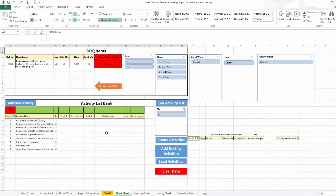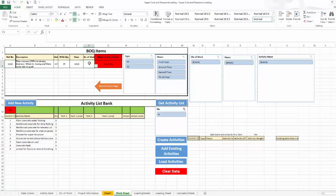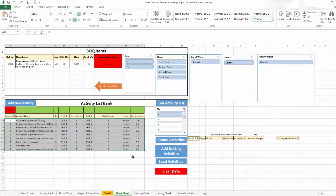Now let's go to the detail section where I can make a very detailed cost loading. In this case, I need to copy and paste for each BOQ item, but I will visit each activity item only one time and be able to do very detailed cost and resource loading. Let's say this is the BOQ item I have — this is division 3. Simply here I can find division 3, click on it, and click 'Get Activity List'. The Excel sheet will get me all the activities in division 3.